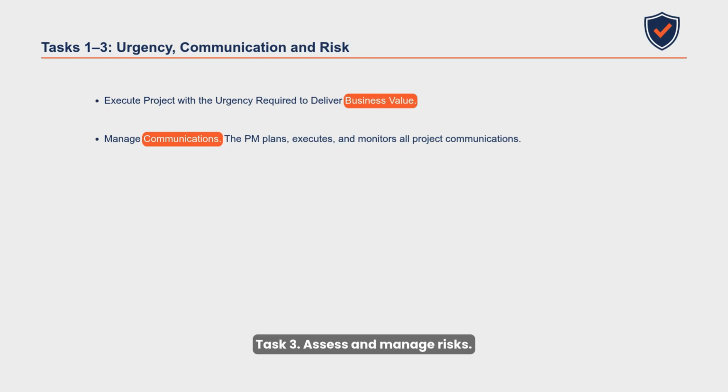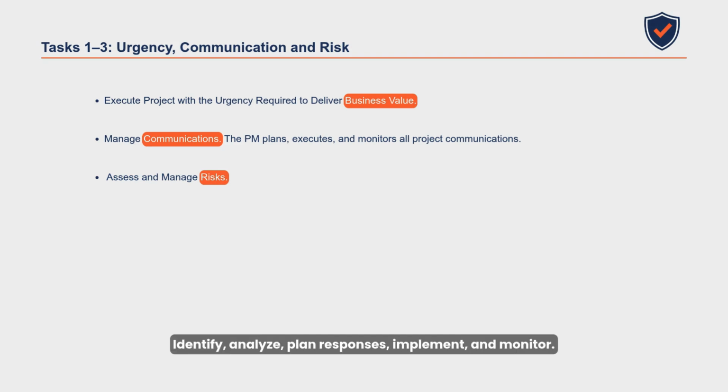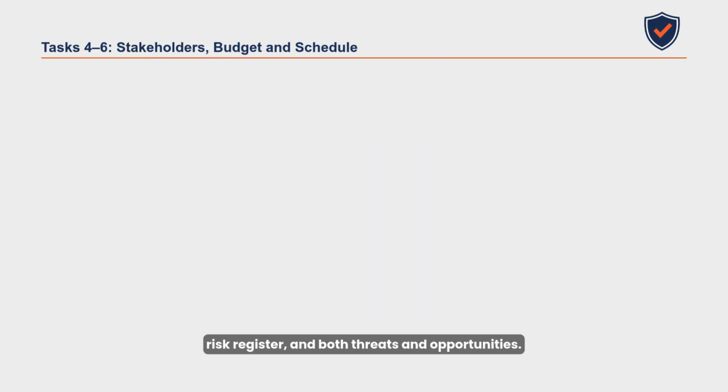Task 3. Assess and manage risks. Risk management is continuous. Identify, analyze, plan responses, implement, and monitor. The exam tests the full risk cycle, including risk appetite, risk register, and both threats and opportunities.